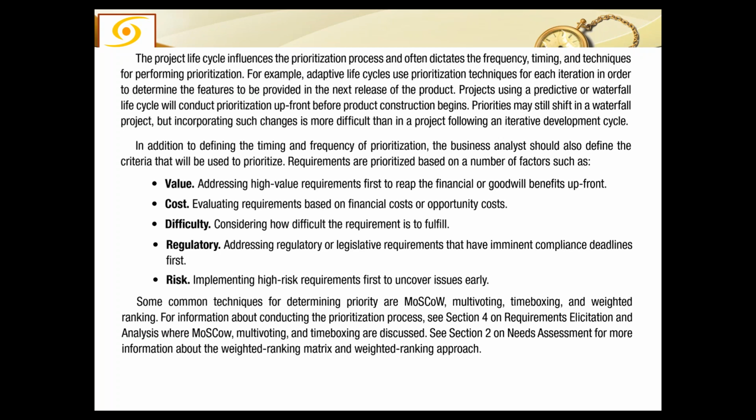For example, adaptive life cycles use prioritization techniques for each iteration. So after every sprint, you reprioritize your requirements in order to determine the features to be provided in the next release of the product, that is the next sprint. Projects using predictive or waterfall life cycle will conduct prioritization upfront before product construction begins.